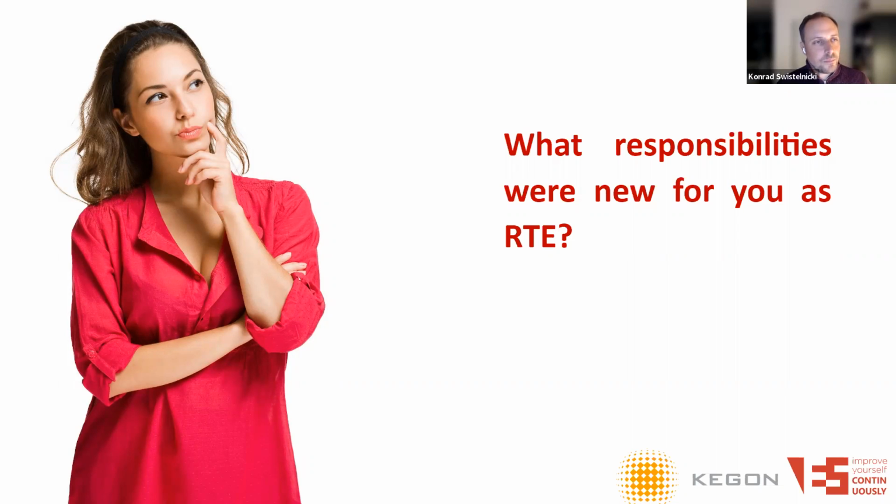So a point related to budgets would simply be capacity allocation. It is very often the case that we have multiple products, generations or areas which we need to address in one Agile Release Train, and then the question is raised: we definitely want people to be able to focus, so we should not have people or teams working on multiple products at the same time. But how to split the overall capacity of the Agile Release Train into multiple areas? How should we allocate, 20% to one and 80% to the other, or 50-50, or any other proportion? This is the right question to raise, and the RTE would be the person to at least initiate that discussion.